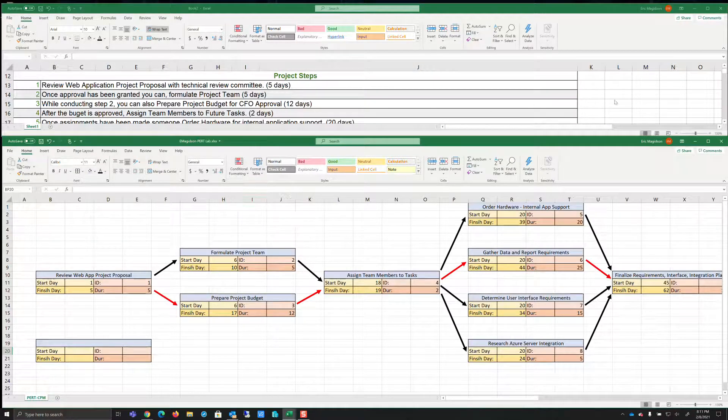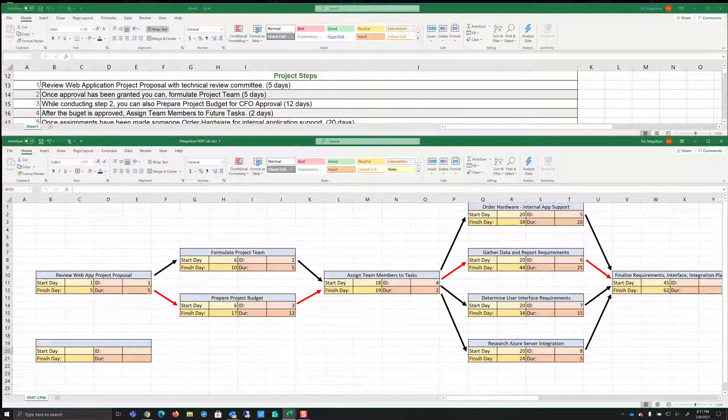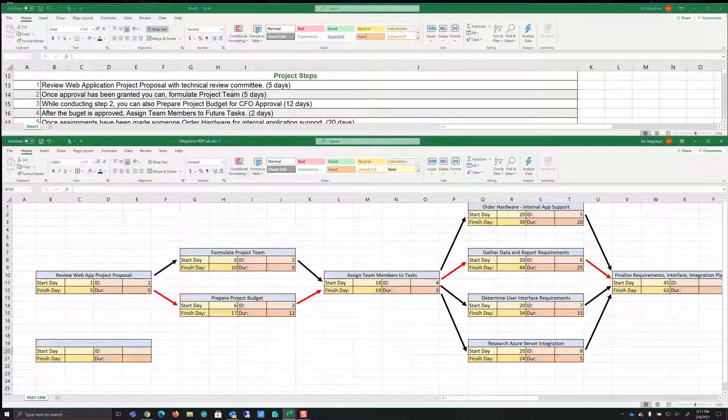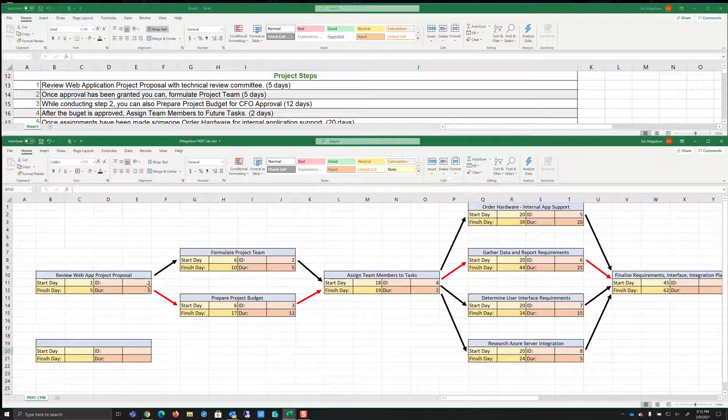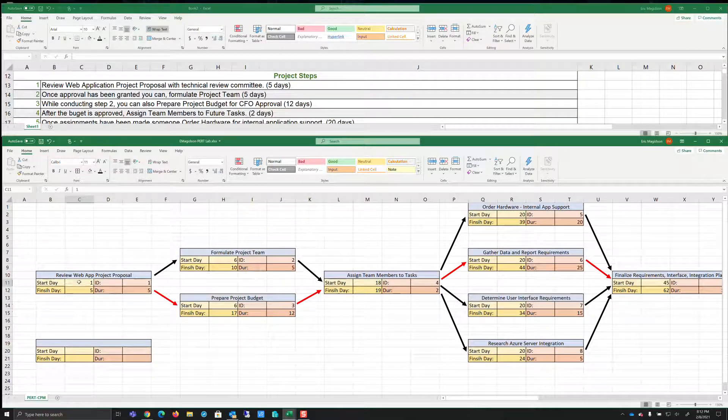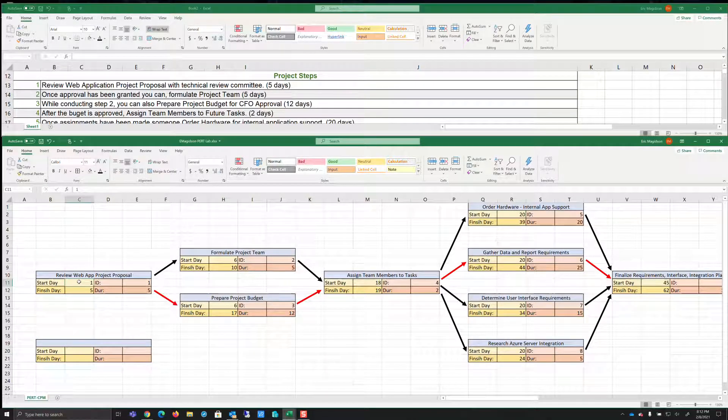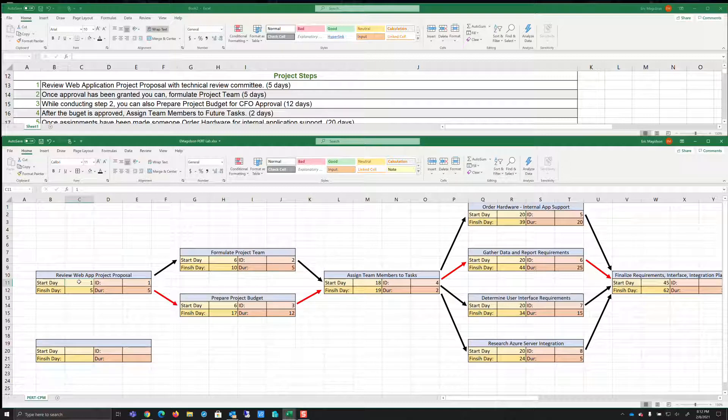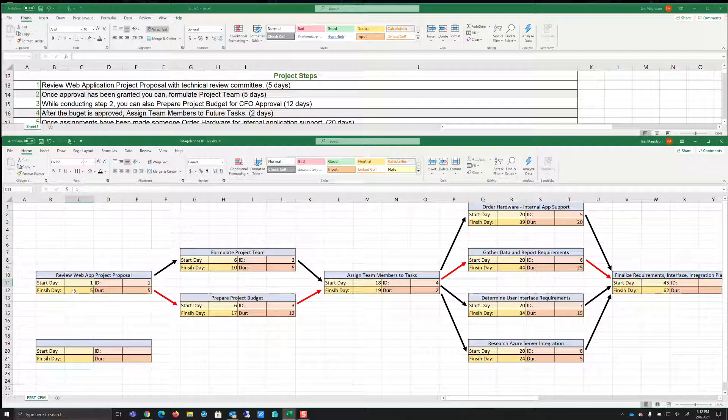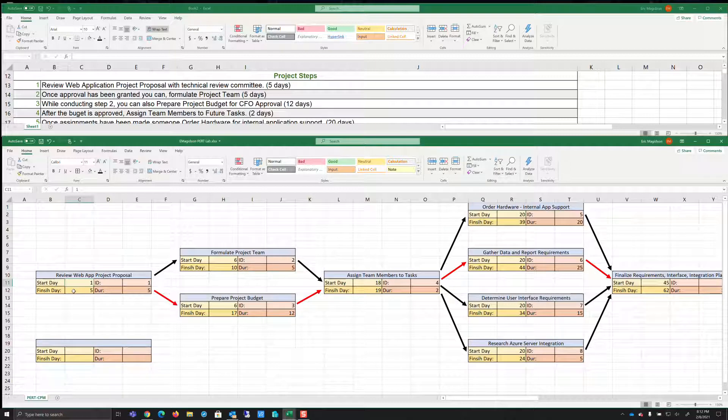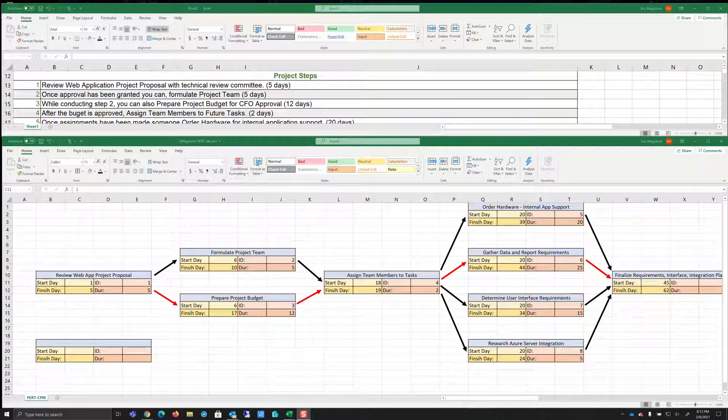First of all, it says review web application project proposal with technical review committee five days. So it's going to take five days to get them together. Now notice I'm starting the project on day one and you always got to remember that the first day is a day we can work on the project. So most people would say, if it's five days, then one plus five is six. But remember, I can work on day one. So if I do this with my fingers and my thumb is day one and I go through one, two, three, four, five, I see that five days only takes five days.